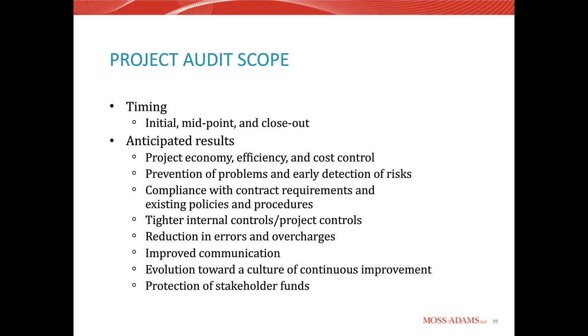Audit scope, so timing. We get asked often about the timing of projects. Really, you can bring in a construction auditor at any time. Probably most common is an initial, a midpoint, and a closeout, and that really depends on the size of the project. The bigger the project, obviously, the potential you might want more touch points. A lot of times, if we get brought in just for a closeout audit, you could still have some great findings and some great work. The only issue is then we're talking about costs that have already been fully incurred, and then we're trying to get costs back that have probably already been paid.